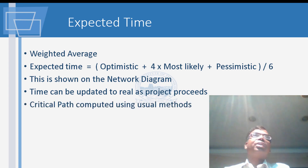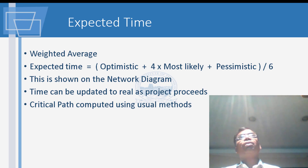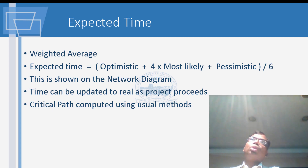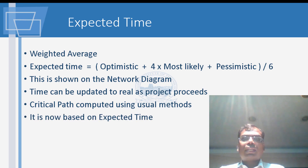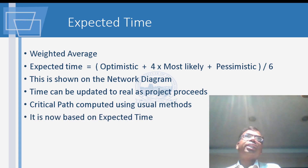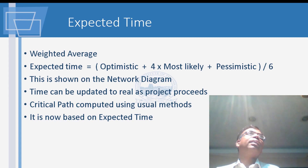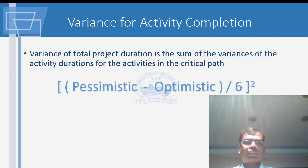The critical path can be computed using the usual forward and reverse pass method. If you input progress in real time, the software uses actual completion data instead of the originally estimated times. This reduces to an expected time, allowing more dynamic updates. Variance tells you how much scatter there is between expected and actual outcomes.